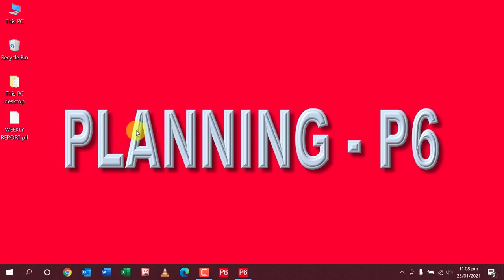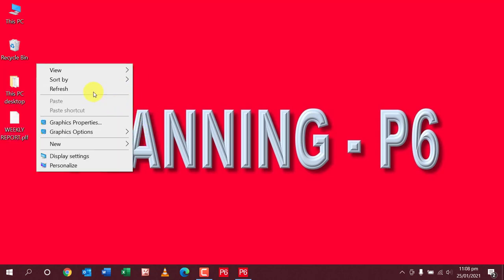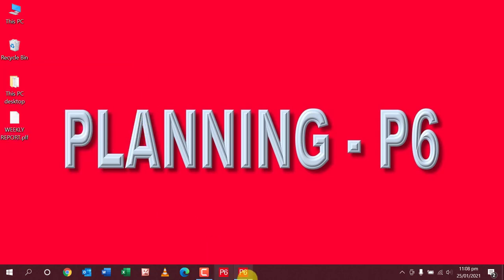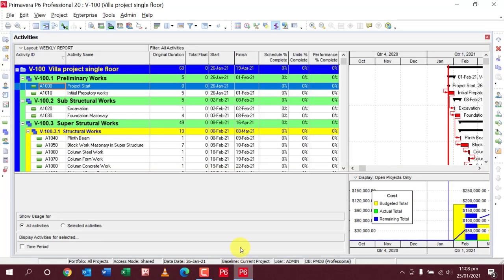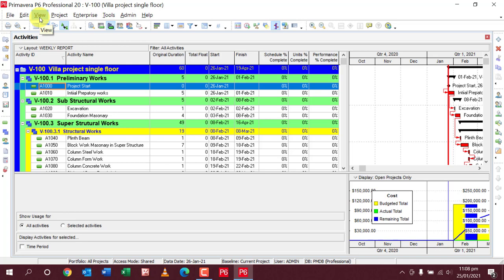Now we will import this file. If you want to move to another system, you can export and import to another Primavera system. If you are reinstalling your Primavera, you must export the PLF file and save it somewhere. Whenever you install the new version or new software, you will import it.